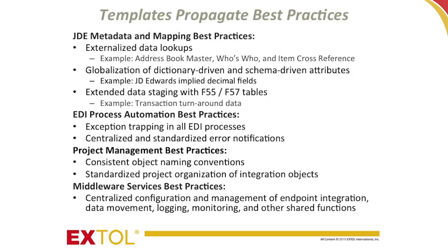And one point that I think Ali will be reinforcing in his part of the presentation is you don't necessarily have to have pre-built templates in order to get those benefits. In fact, if you look at the amount of time it saves you in a project to use pre-built templates, generally it's on the order of a couple of percent of the project time. And the more trading partners you're integrating in a project, the less time savings you see because proportionally the amount of time you spend building templates is smaller as you integrate more and more partners. So the point is, it's not really time savings that is the big benefit of templates. It's quality, it's consistency, it's enforcement of best practices. That's really the major benefit that you get.